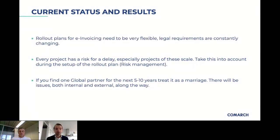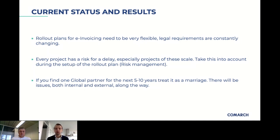Greece already has a regulation approved by parliament but not yet implemented — it could be that from January 1st, 2021, e-invoicing becomes mandatory for everyone. We have to follow all mandatory regulations in our planning. Every project has a risk of delay, especially at this scale — a rollout in 44 countries doesn't happen overnight. It can happen quickly with Italy — one connection, simple onboarding, done in a couple of weeks. But for other countries where e-invoicing is not mandatory and business partners are reluctant, it takes much more effort.